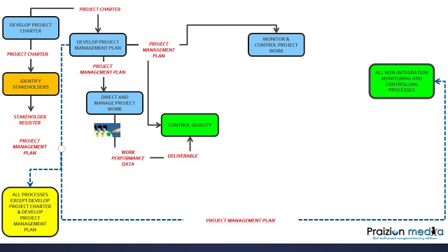Just remember that, okay? Now, the lady on the conveyor belt again, Lily, you saw her in the last slide. She's here again. Now, from control quality, folks, we get work performance information. From control anything, if it's called control something, we're going to get work performance information as well. You see? This is why I call this the main line. I'm trying to make sure that the overarching concepts are ingrained into your mind.